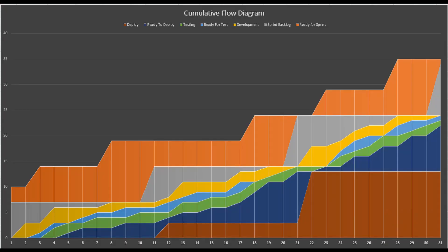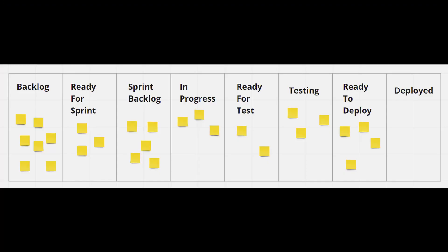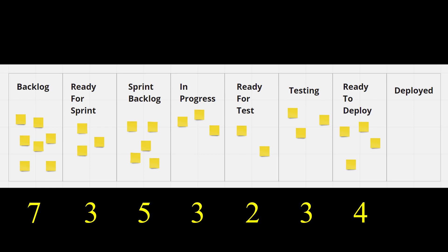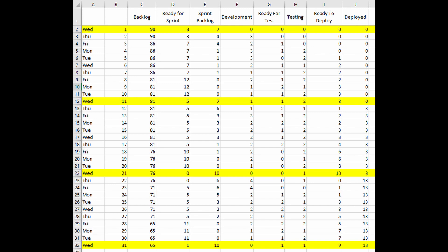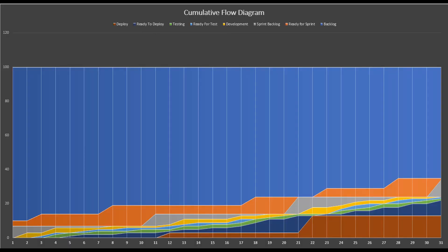Here we have a sample CFD and this is what it looks like. A cumulative flow diagram is basically, on a specific set time — usually on a daily basis — all you do is count the number of work items that you have in the states where they're at. Once you have this data, all you have to do is go to Excel, put it in, and then transform that into what we call a stacked area chart.